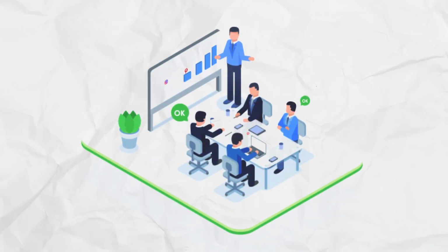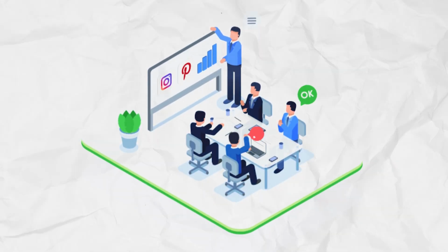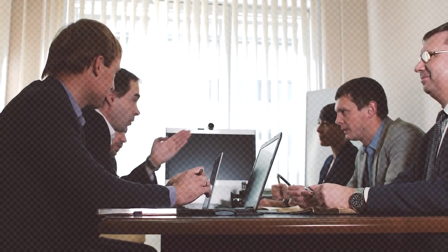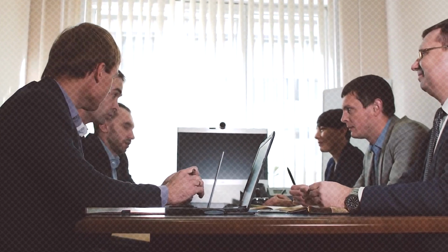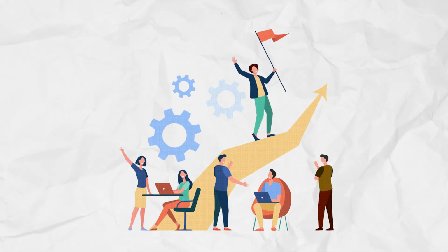So it's important, again, the product manager needs to drive it. What does it mean to drive the meeting? To make sure that everybody is getting the chance to talk about the stuff they have done. So time boxing is going to be important, because many times what happens is someone in the team who's demoing gets too much in the flow, and they might take maybe 20 minutes of the 30 minutes, because 10 minutes are dedicated for questions and answers. They take the entire 20 minutes and the other team members do not get a chance. I think the product manager needs to sort of police the meeting as well, to make sure that everybody is getting the chance to demo their stuff.